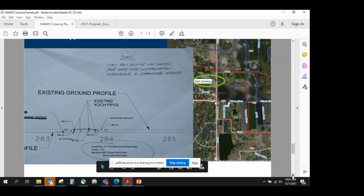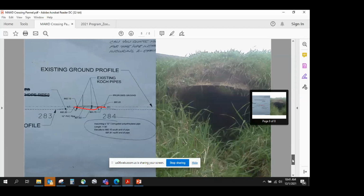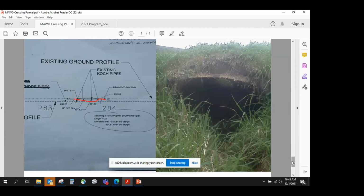The irony behind those pipelines being located like that is that in addition to them being set there, there's a culvert that's already set between those. Through the years, we had found out approximately 5 years before this that this culvert was a 36-inch culvert that was actually squished flat and fished through these oil pipelines that were set under this crossing. So other than the outlet ends of the pipe, the invert on the upper and lower ends, which were set very close to or within our tolerances for the approved elevations, almost none of this pipe functioned as it was supposed to.